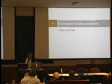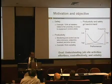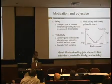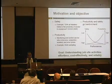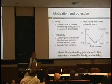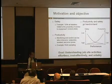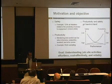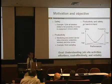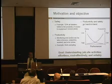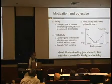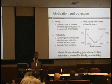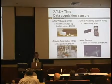In another application, Pfizer and Bella worked on understanding job site activities. What motivated them was that, in terms of safety, 25% of fatalities are related to the proximity of workers to equipment. In terms of productivity, we know that monitoring and control can be labor intensive, subjective, and isolated. So the goal of this research was to understand job site activities in a portable, cost-effective, and reliable manner. They used these technologies for developing the model: ultra-wideband global positioning system, a robotic total station, and video cameras.